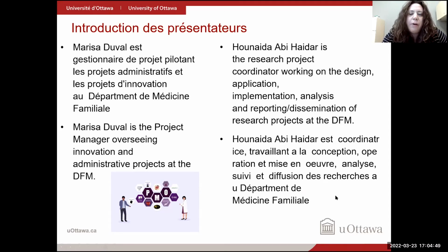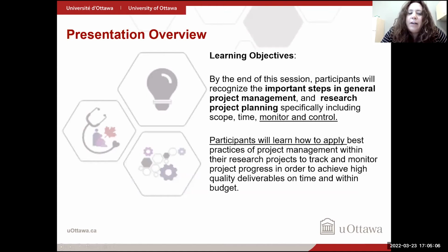And PMOs in general are responsible to ensure that the aim and vision of the projects we undertake align with not only the department's strategic objectives and goals, but the university at large's strategic goals as well. And PMOs can act in a variety of ways, including supportive roles where we could be more like consultants, in a controlling role where we ensure compliance and reporting and certain templates are used, or in a more directive role where we take control over the day-to-day execution of projects.